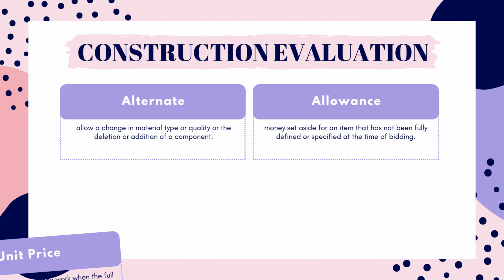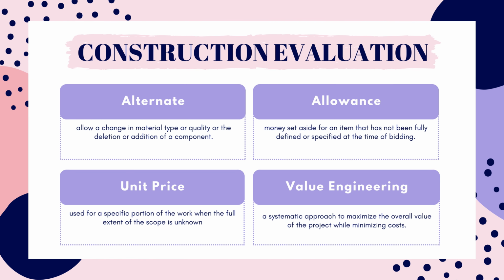So this question came from a project I'm actually working on right now. I have a training center where we fully designed a solar array for 2 buildings, but our client wasn't sure if they'd have enough funding when the project was supposed to start construction. So we listed it as an alternate in the bidding documents. Fortunately, their funding did come through and we are putting solar panels on both of those buildings. Woo! So alternates provide options and flexibility in pricing for the owner.